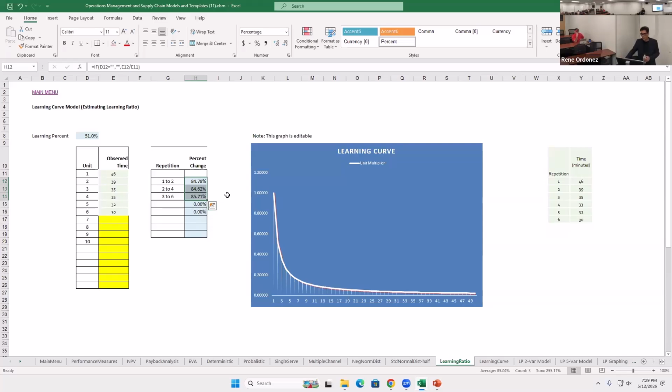Okay, so you can just observe how long it took for the first time, the second time, and so on and so forth. So the key here is that, one, it is a complex process, and two, that you're going to repeat this complex process multiple times. And each time you carry out the process, you or your crew are learning something, you create efficiencies or you cut out non-value-added activities or steps, because you're learning and understanding how to improve the process. So the repetition there is key. Without repetition, this becomes just a one-time project.